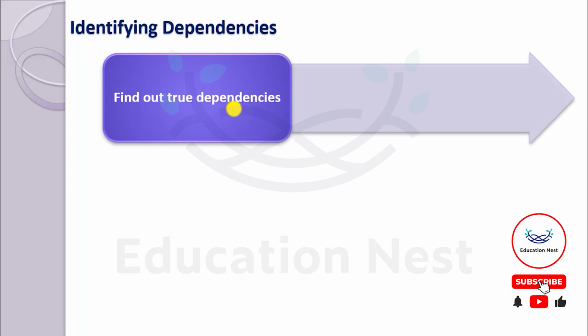Initially, I made a similar mistake when I was a project manager. For the first time, I used to think everything would happen sequentially, like traditional SDLC: first you have requirement gathering, then coding, and it will fall in place. But trust me, it doesn't happen. So as an expert project manager, the whole skill goes into how you identify the dependency.